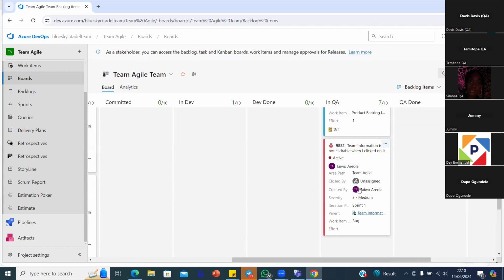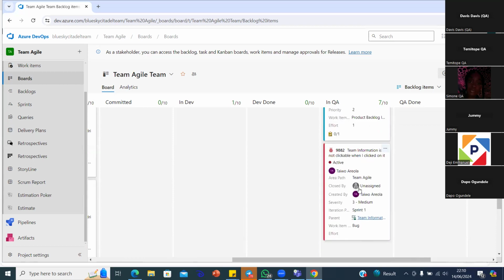Okay, all right, cool. So now what you are going to do here are two things. You need to test the story. No, you need to test the bug, right? To ensure that it is fixed. So you open the bug and you go through, oh, now it's fine, it's okay, right? You confirm what is there against the application. Does that make sense? Yes. Okay. And if it's fine, what do you do? Put it to QA done. Okay, let's move it to QA done.